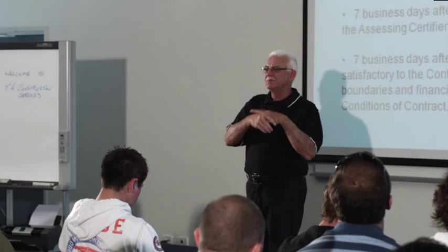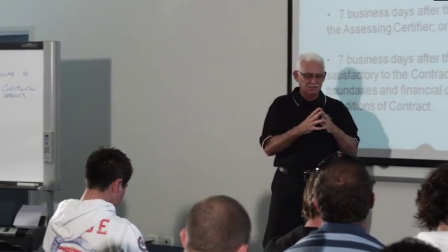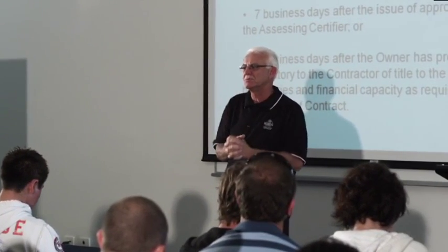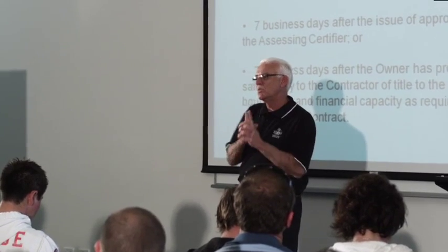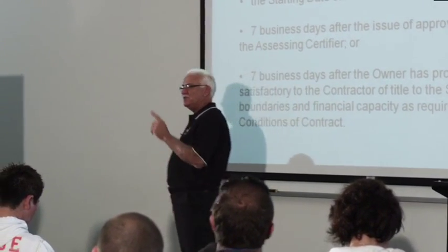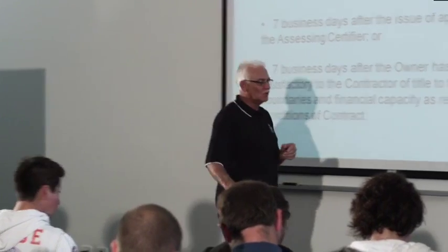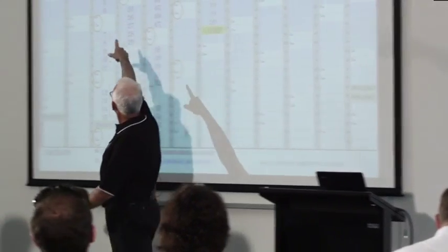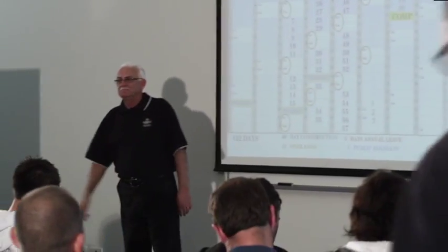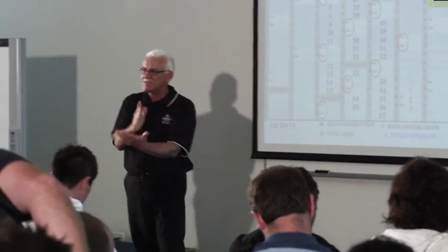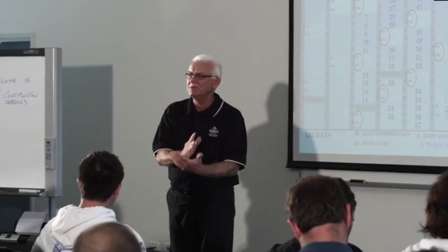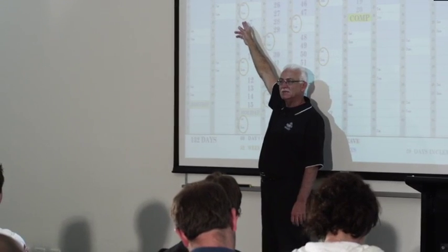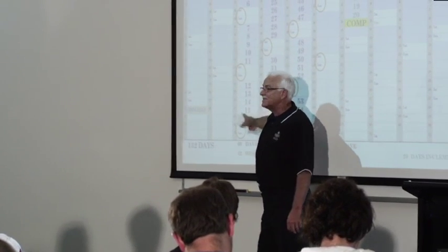All right. Now you as a builder, you've got the expertise of doing this sort of stuff, so you might put in your contract that you will be responsible for building approval. This is where the commencement date is very important. If you put a commencement date on your contract, I'll go back, you say that you're going to start on the 7th of March. That's the commencement date on your contract. You're going to start on the 7th of March. What happens if you don't get building approval? You haven't got building approval, so you can't start, and it might be 3 or 4 weeks depending on what the problem is.